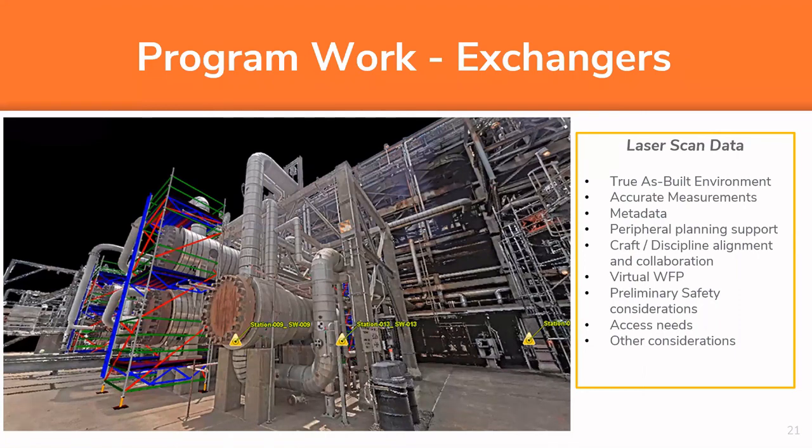So those are a couple of scenarios that we've experienced along the way where we're taking our technology. There are things that we're doing within our organization to allow us to do things like place the scaffold in this model so that we can get virtual acceptance. And how we endeavor to bring value to the customer is, if we can agree to access needs and designs up front virtually, then that eliminates some of the rework and some of the modifications that we're currently experiencing, which again achieves the end goal, and that's reducing cost on the project.